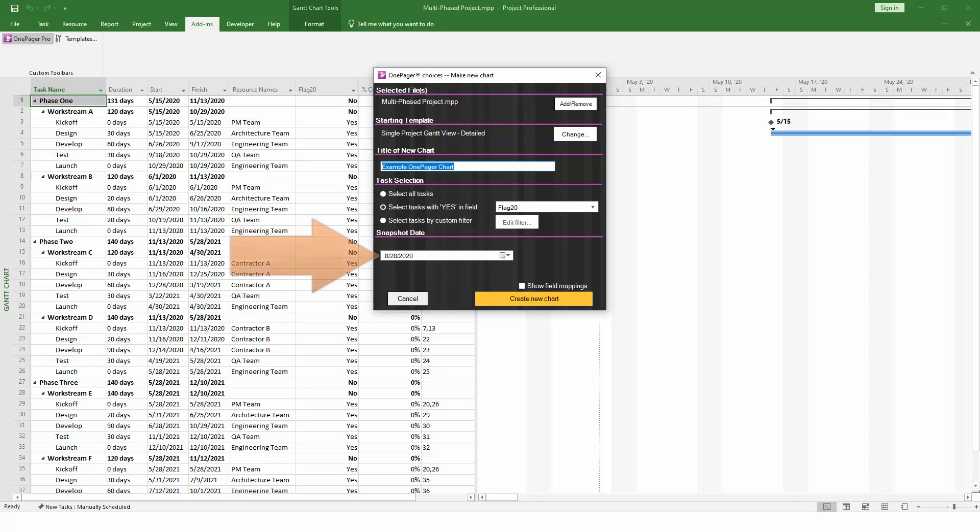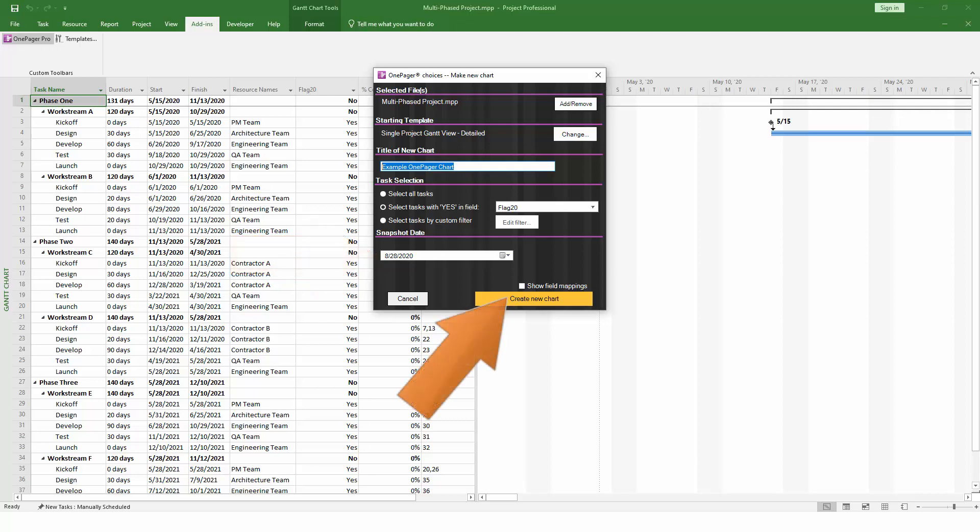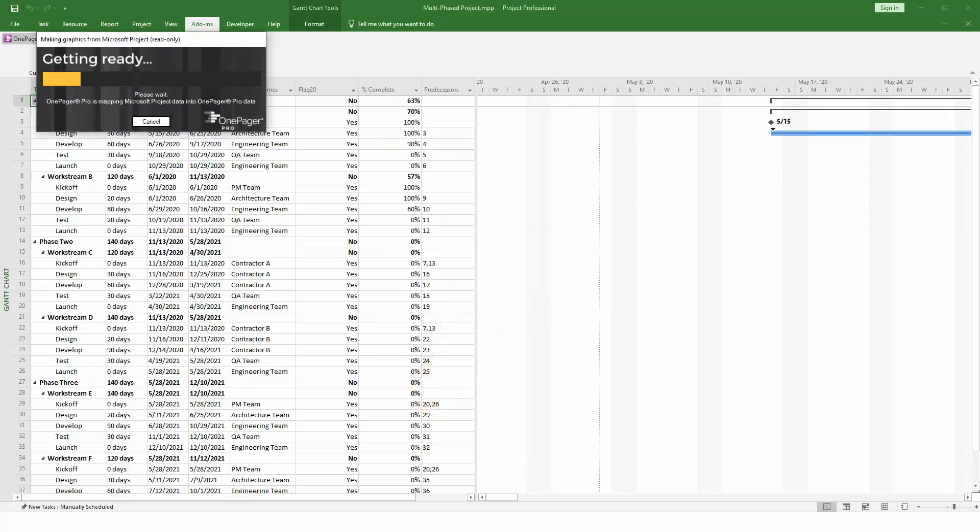The snapshot date is the status date of the report that you're about to create. Over time, you can update the same chart with a different snapshot date, which will enable OnePager to track changes to your project as they happen. Typically, when creating a new chart, you can just set the snapshot to today's date. Everything looks good, so we can click on the Create New Chart button to kick off the import process, which usually goes pretty quickly.